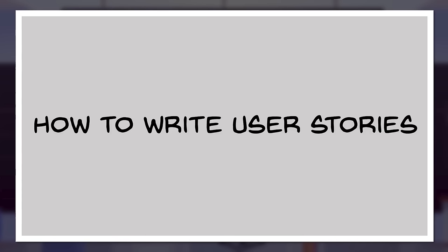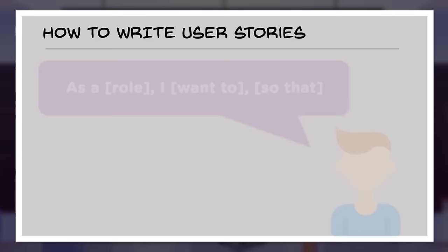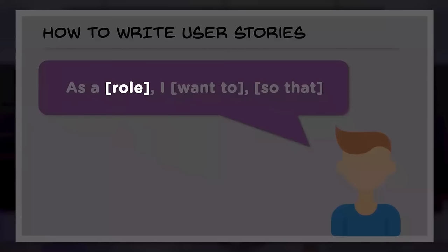So then how to write a user story? This is a very important point to look at. Writing user stories comes with a specific template with simple language. So what is it? As a role, I want to, and you keep filling it. Typically, role means the specific user role who would be using that particular product, and their requirements which are being fulfilled. So that is the role. The name of the role, we are going to put it here.